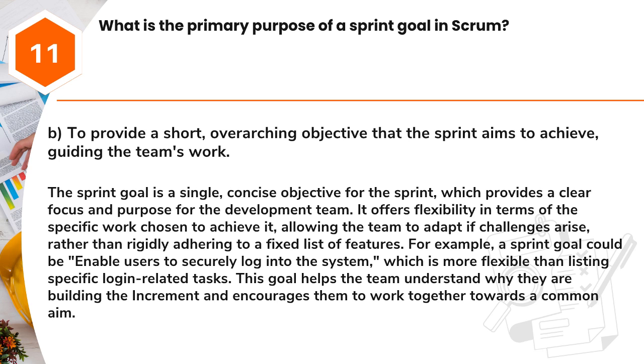For example, a sprint goal could be, enable users to securely log into the system, which is more flexible than listing specific login-related tasks. This goal helps the team understand why they are building the increment and encourages them to work together towards a common aim.